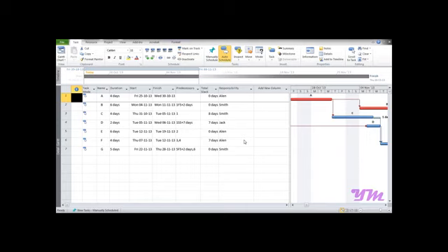Module 4, if and switch functions. Like Microsoft Excel, Microsoft PowerPoint 2010 also has capabilities to use conditional formatting using functions such as if function and switch function. So to begin with, we would be starting to learn if function first. Suppose wherever there is 0 days slack, you want to display over here that critical activity. If slack is equal to 0, then display critical activity, and if slack is non-zero, then you display non-critical activity.